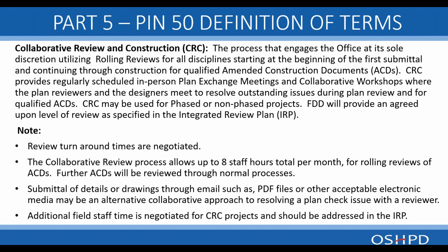Collaborative review and construction, CRC. This is based on the new proposed definition. The process that engages the office at its sole discretion, utilizing rolling reviews for all disciplines, starting at the beginning of the first submittal and continuing through construction for qualified amended construction documents.